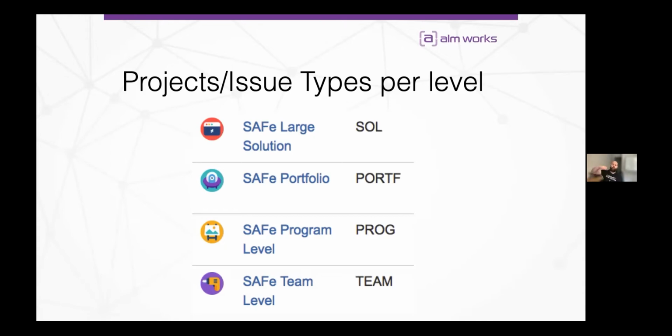And then anything above that, every level gets its own project, because you're going to have different rules in place for each one. And you want to be discrete in where these things live, because there are going to be different stakeholders. And it's just easier, instead of making them Jira experts, to give them their corner where they can see, this is what I own. These are the adjacent elements that I care about. But there's also a distinction between I own this and it needs to stay up to date, and this is where I'm just getting information from. And then finally, for each team, I highly encourage you to have a separate Jira project for each team. So those are just kind of the rules of thumb.